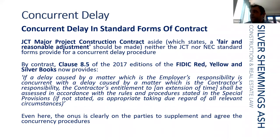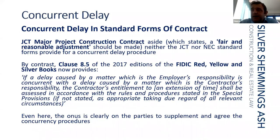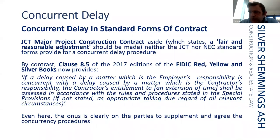Looking at how standard forms of contract deal with these points: neither the JCT nor the NEC standard forms provide any mechanism with a concurrent delay procedure. It is quite a difficult area — we go into base points of causation. Just because neither the JCT nor the NEC deal expressly with concurrency, going back to their first-principle approach, it doesn't mean that parties don't use the time before the contract period to crystallise and address the issue.